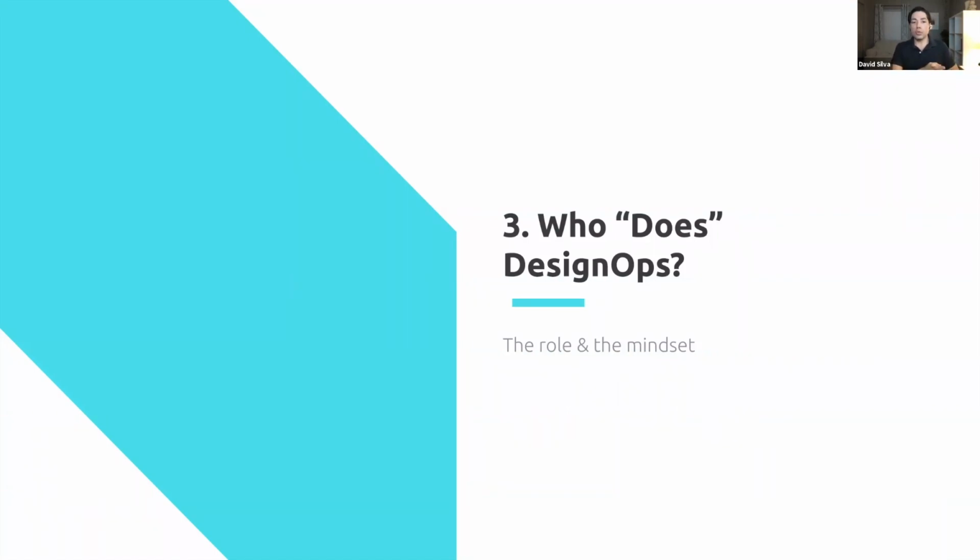And then getting it done was very easy because you can say done is you deliver by X time, which is the due date, and it was received successfully by the requester. Now, the quality is about, was it the image that they were looking for? Were there revisions? Was there one where there were 25 revisions as opposed to one?